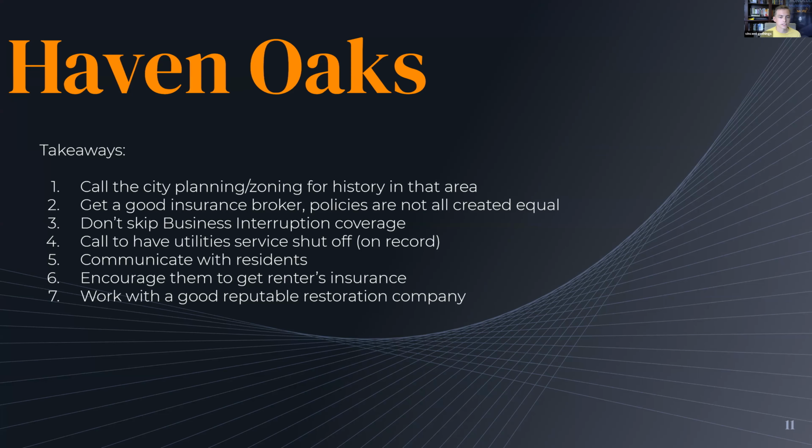Require flood insurance. And they built like this kind of dam or dike around the property, which tipped us off that this place probably flooded at one time. So we knew that going in. So I called the city. They sent me this big, huge package from the last flood. I got to read through it, see what the issues were, how close it is to the waterway, everything like that. We bought flood insurance.